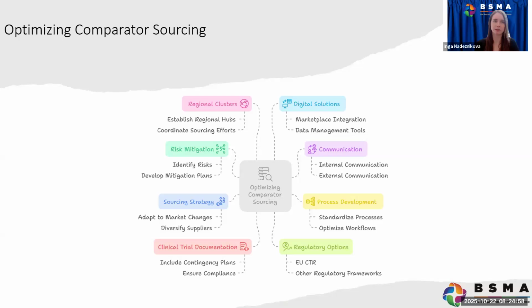People who are involved in it include regulatory, because one of the things that you want to determine is the sourcing strategy, right? Do you have to provide the product centrally? Can sites source it themselves, or are there options for local sourcing as well? So what we do when the product is known, the tool provides available presentations that are in the market and the costing for it. And then the regulatory team has also provided inputs per country. We have some knowledge as well of whether there will be some pushback. Let's say if this country is centrally sourced, it could delay the trial by 2 months because there will be resistance from the sites to source the product themselves.